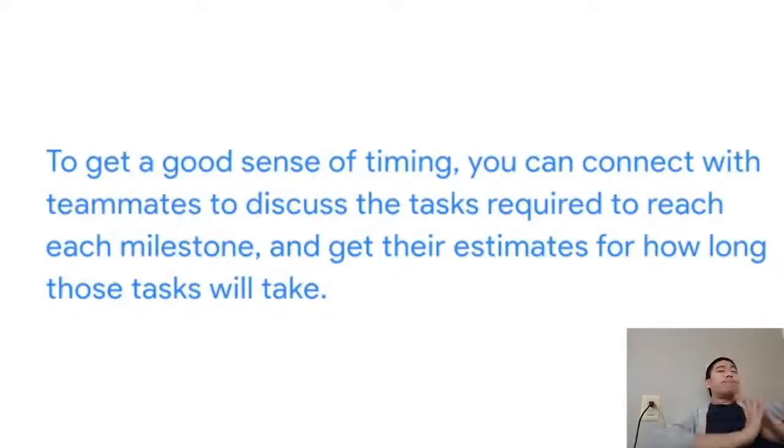To get a good sense of timing, you can connect with teammates to discuss the tasks required to reach each milestone and get their estimates for how long these tasks will take. With those estimates in mind, you can make an informed decision about reasonable deadlines for each milestone.